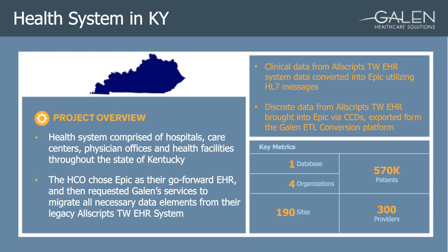So after working with some in-house team members and with my core conversion team, it was clear we didn't have the expertise to pull the data from Allscripts. So my conversions team lead luckily found Galen, and we had several discovery calls with them. I did check their 3 client references before moving forward with a contract execution, and so glad that I did that. It was almost too good to be true from the references, so luckily we went ahead and partnered with Galen, and they filled our gap perfectly.